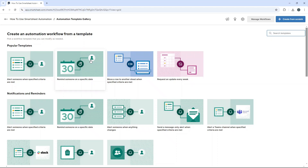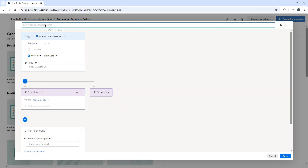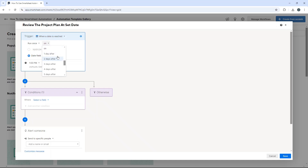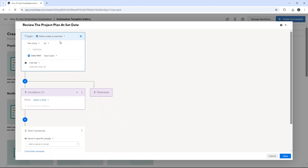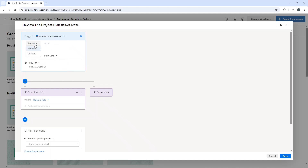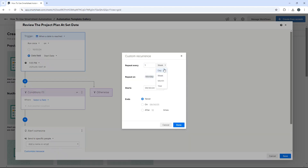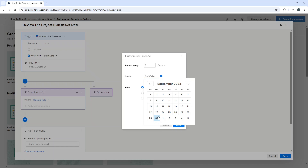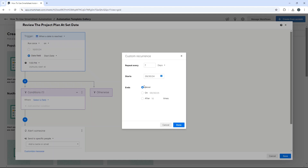Let's do another one: 'Remind someone on a specific date.' Use the template and call it 'Review the Project Plan at Set Date.' When a date is reached, you can specify how often you want it to run — one day after, two days after, up to 30 days, one week, two weeks, and so on. I'm going to run it on the date and set it to repeat every day for seven days. So if the project manager hasn't updated by the set date, they'll be reminded for seven consecutive days. It starts today — 30th September 2024 — and never ends.